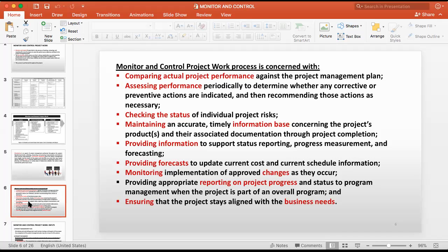While doing the work, you go through that and check whether you have addressed those risks, or whether there are some more risks. So how are you going to address this one? What is the status of that risk, whether we have achieved that, what is the action we have taken to curb that? Likewise, you have to think. So you are checking the status of your risk register.